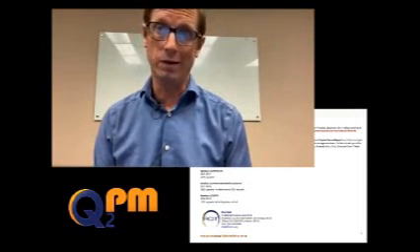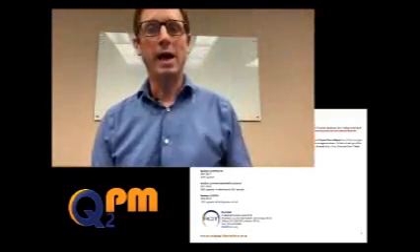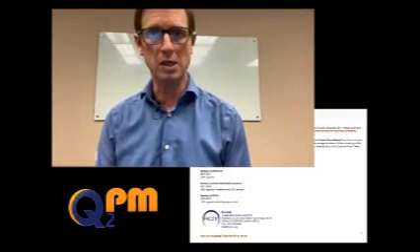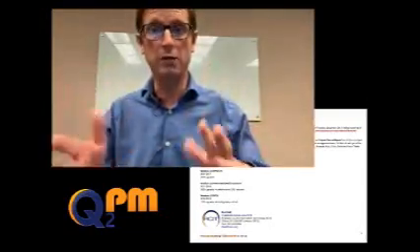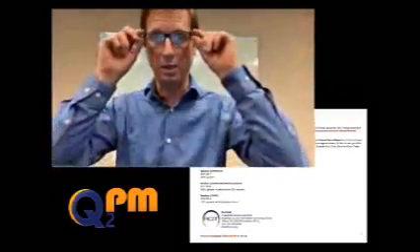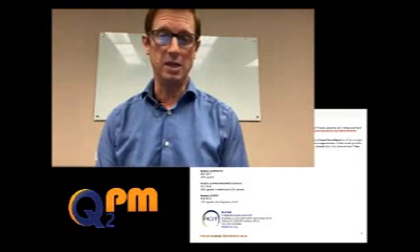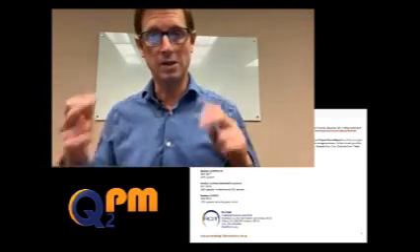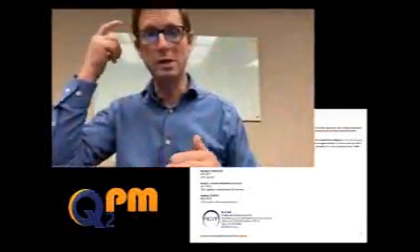So I currently work for another week or two, the County of Riverside, California, USA, Department of Public Social Services, aka DPSS. And I just finished off a 3-year project where we upgraded for the Department of Social Services over 6,000 workstations, either through on-site upgrade of systems or through refresh through our assets division for the Department of Social Services. This was a very large project encompassing 3 separate phases. We broke the project up according to the three various networks that the DPSS has, the C4 network, the CWS-CMS network, and the DPSS proper network. So we went network by network, and we did that over 3 separate years.